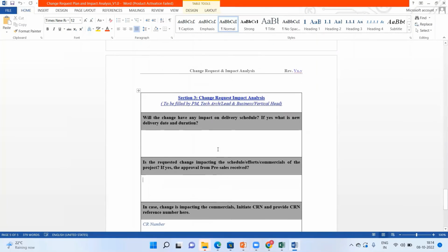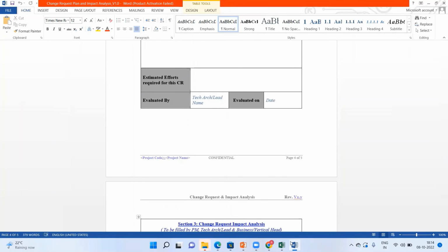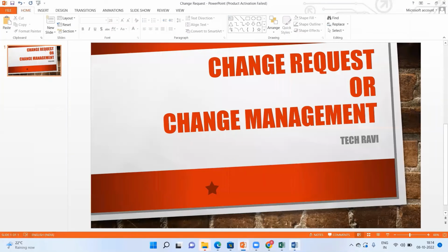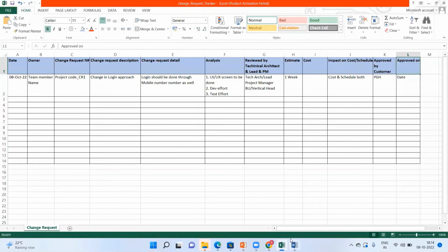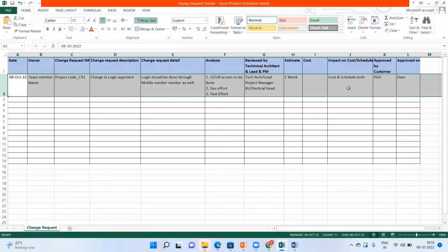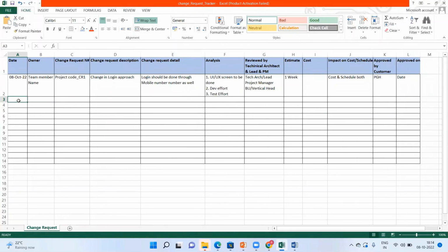So this is for one requirement. Similarly, you have to apply it for multiple requirements. You follow that process and put the summary from the document for one requirement, and similarly do it for the other requirements: CR01, 02, 03, 04. That is how you can do it for the 13 requirements, or X number of change requests. You can do it for everything, and then you will find the overall cost, estimate, or schedule impact on the project, and it gives a clear picture.